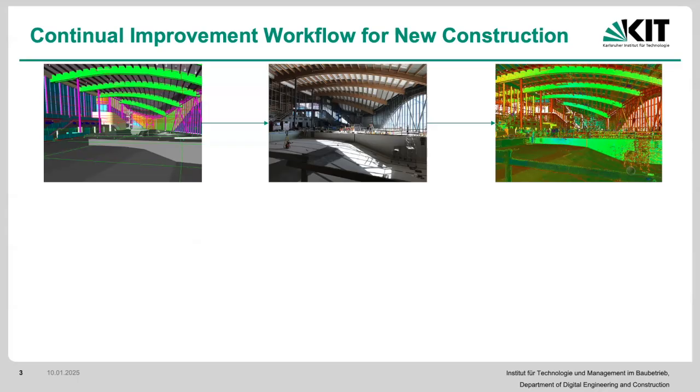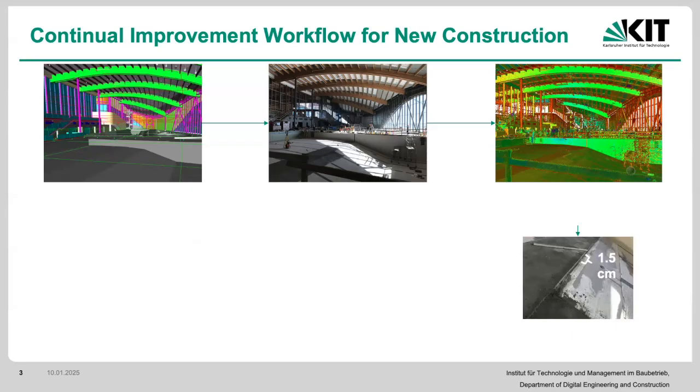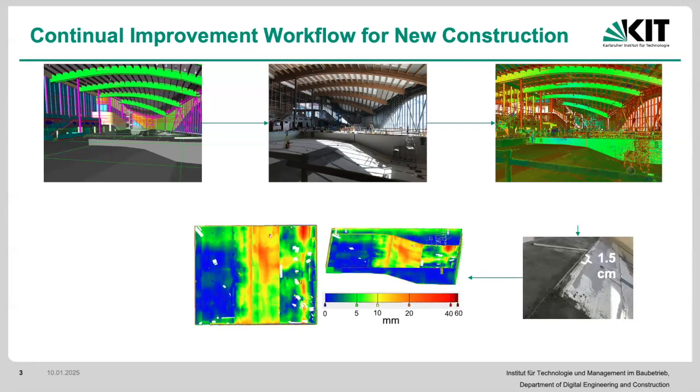So let's say at that particular time we make a decision, we can actually record that decision. Once we have that, dependent upon how these are changing or if it's not, let's say, complying with our plan, then we can make some sort of decisions. Once we make the decision, we have to go back and actually revise our plan for the remainder. And we talked about the fact that if we identify these earlier on, what is going to happen? We're going to have higher chances of us being able to prevent these before it needs rework.